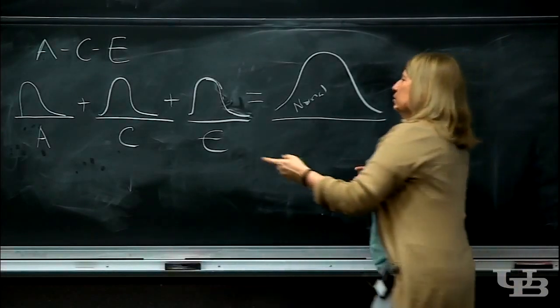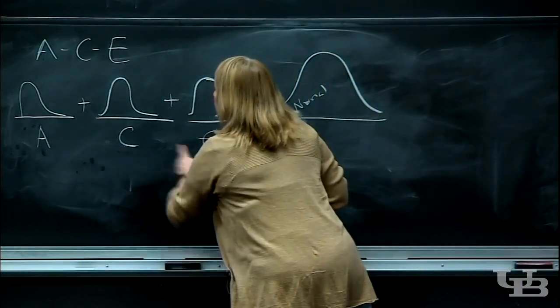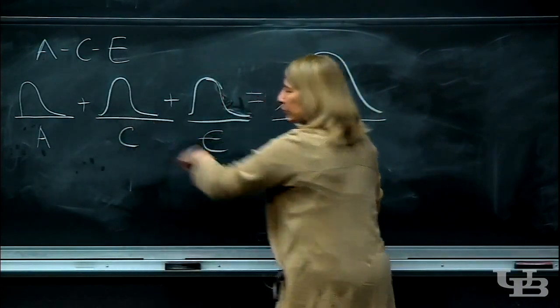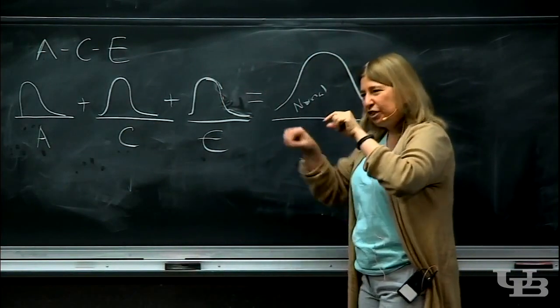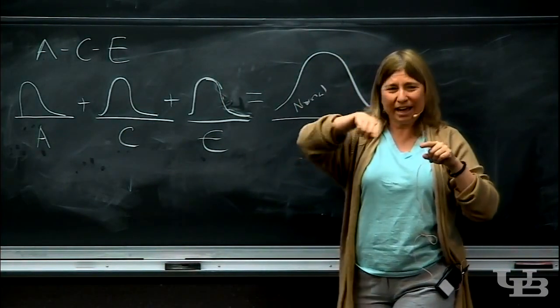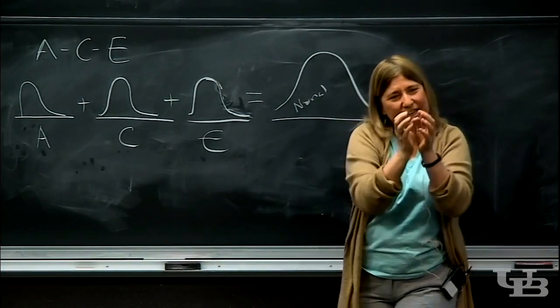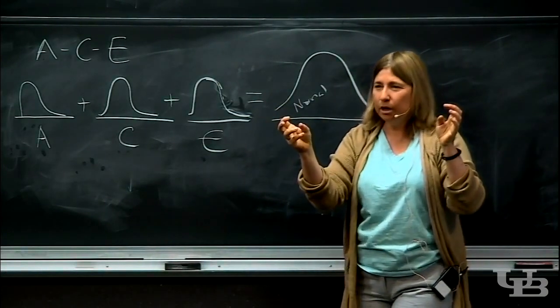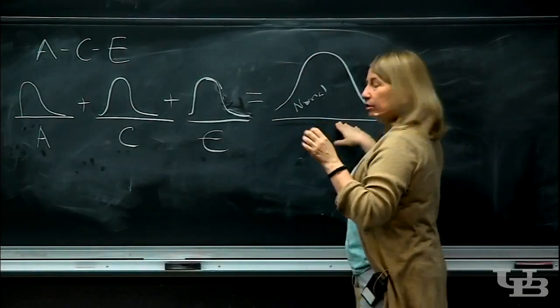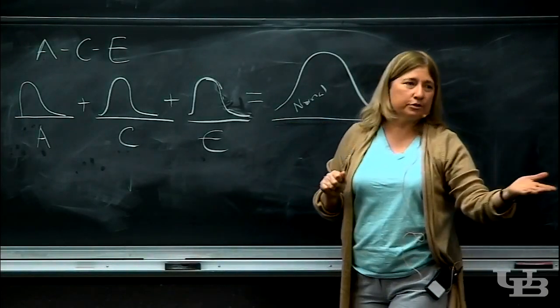Okay, you can have random variables, and they're all misbehaving in some certain special custom way, like a beta distribution. But if you're threading them together, like adding up their outcomes, and it's the outcome that you're concerned about, not their individual misbehavior, the outcome is going to converge to a normal distribution. That's the central limit theorem.